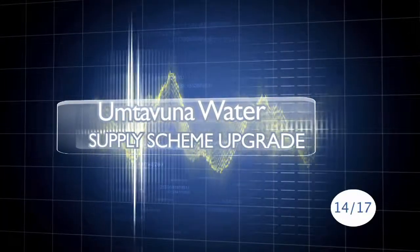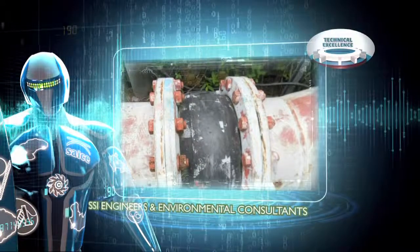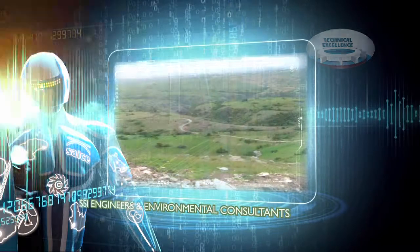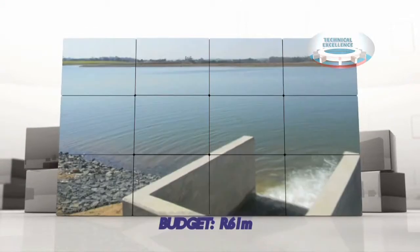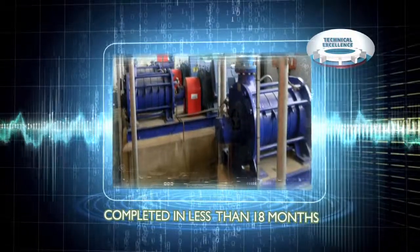Umtavuna Water Supply Scheme Upgrade. SSI engineers and environmental consultants submitted the Umtavuna Water Supply Scheme upgrade. The Ugu District Municipality had been struggling to meet increasing demands on water supply to KZN South Coast and commissioned SSI to upgrade the river pump station and link it to a mountain-top storage dam. The 61 million rand project was completed in less than 2 years and without interruption of water supply to users.